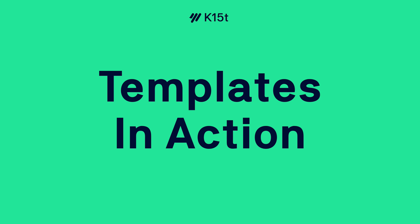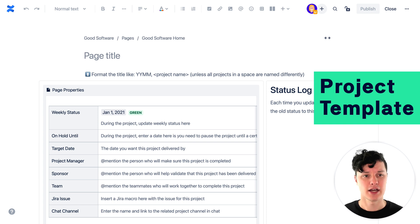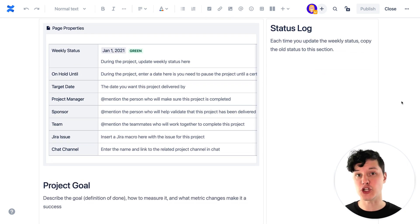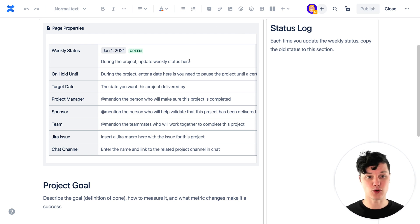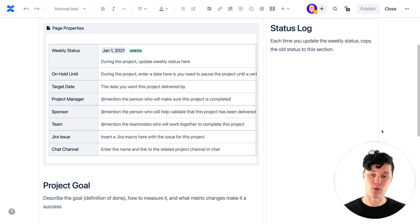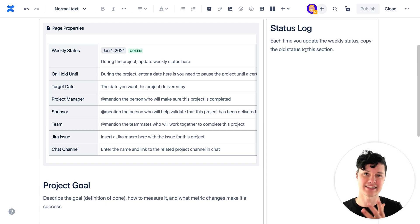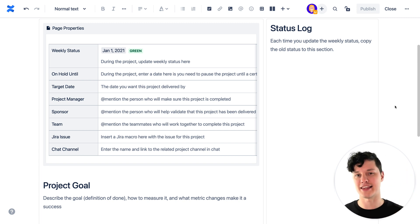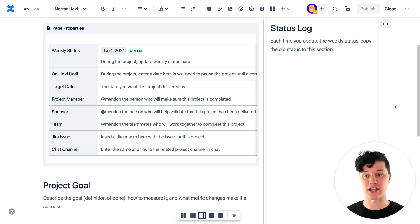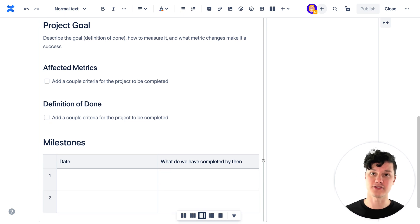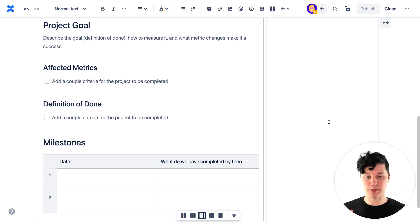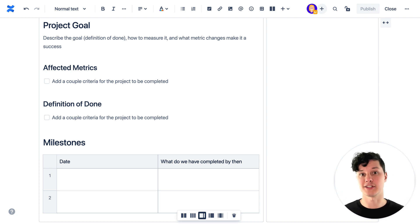Let's check out the project template and see why it's really useful. As a project manager creating a new project, you don't have to think about what information should be there — it's already defined with instruction text so you can just start typing, setting dates, and so on. There's also a status log area along the side so each week you add a status update. The team can also see project goals, affected metrics, definition of done, and milestones, so anyone reading the page knows the status, what's been delivered, what is yet to come, and what the final outcome will look like.